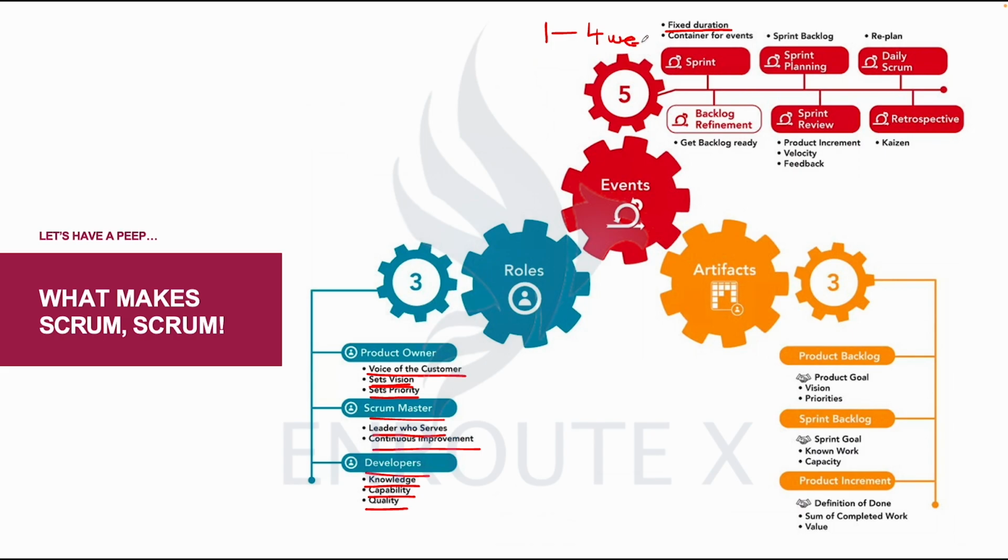That is the sprint. The sprint is between 1 to 4 weeks. And I mentioned in previous classes also that each team or organization would settle for what duration they want. By the time a team picks 1 week or another picks 2 weeks, that is the model they will stick with from beginning to the end.